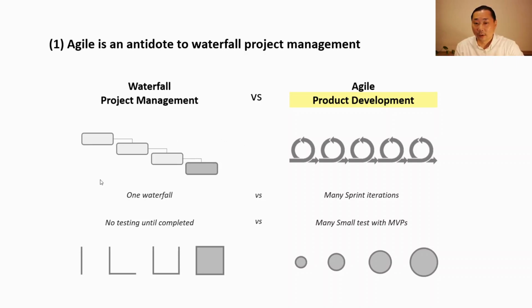In waterfall, we can only find out if our assumption was correct at the very end. It's an expensive way to fail. Hence, we should reserve waterfall only for projects of certainty. And for projects of uncertainty, better do it in iterations. Therefore, Agile. For example, in Lean Startup, we build, measure, learn in MVPs.